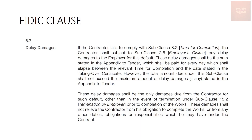Basically, what this clause means is that there is a time for completion mentioned in every contract. Every project has a time for completion that needs to be adhered to, and if this completion time is not satisfied by the contractor due to their own problems, the employer can fine them. That fine is what is called delay damages. This claim is done as per subclause 2.5 (employer's claim), and the damages claim is expressed in days — for each day, a particular amount is included in the appendix to tender. When you receive a tender to fill up, there will be an appendix to tender where you fill in this delay damages percentage or amount.